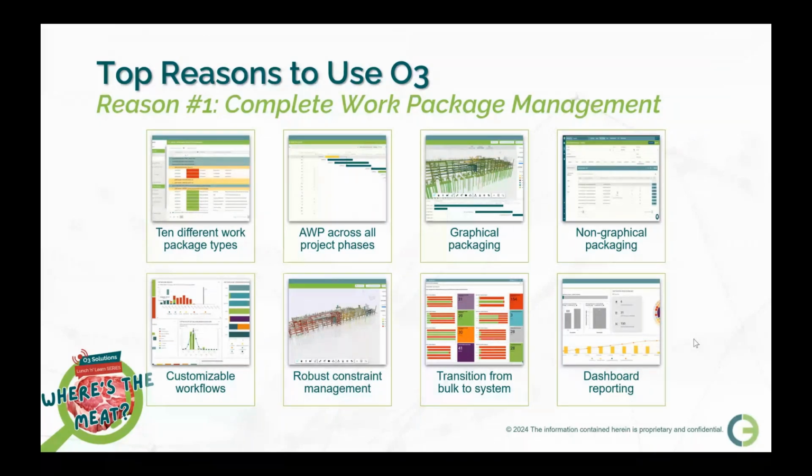So I know if I need to turn over the instrument air system in 6 weeks, I can look at a view of my model and I can look at all of my packages and determine whether I'm going to be on time to release that in 6 weeks, for example.